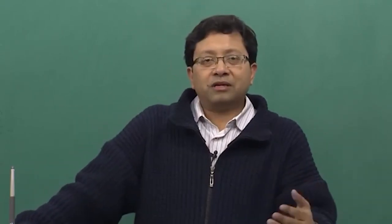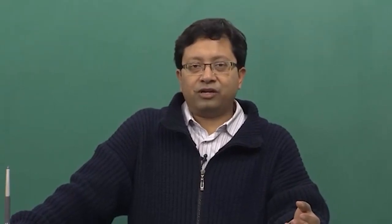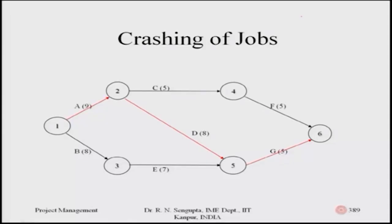This has been replicated in the activity-on-arc network diagram format. The jobs on the critical path — based on total slack and free slack — are A, D, and G. The total time required is twenty-two: nine plus eight is seventeen, seventeen plus five is twenty-two. The total cost includes activities A, B, C, D, E, F, and G all combined, which comes to fifty-five.